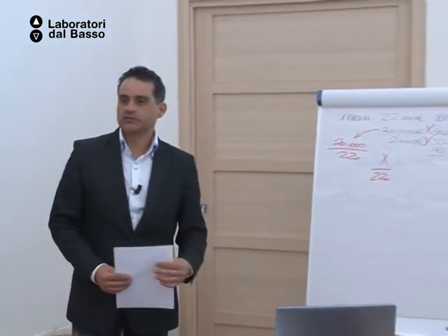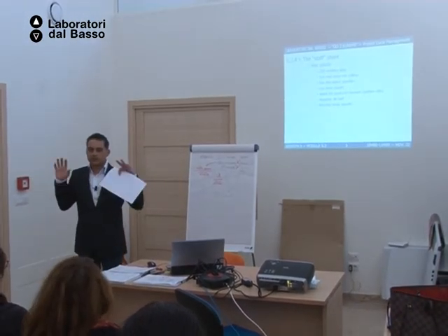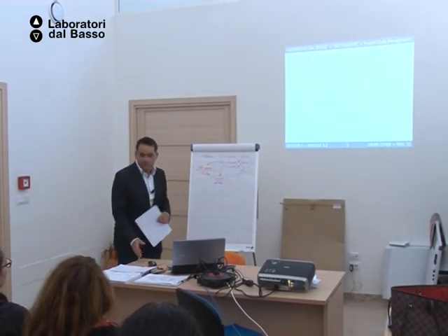You remember in this framework, you have two mandatory meetings per year in Brussels. Generally, the top manager of the project goes there, and you have templates that you have to use. We're not there yet, but all the information that the agency needs you to provide is structured under their own system, because imagine if all of us had our own way of saying things, it would be chaos. So at any time you'll be able to give a Polaroid, a picture of what's going on. Again, we are talking about real things.